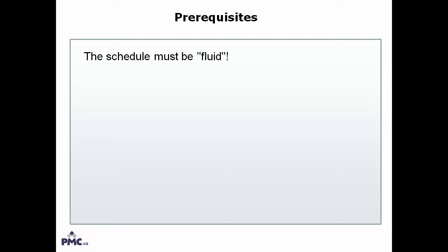The schedule must be fluid. This means that if we delay tasks and have them move into the future, they should be able to do so unencumbered. That means minimizing or even avoiding dependencies such as must start on, etc. Start no earlier and using deadlines works nicely. The network of dependencies should be complete. Leveling delays upstream should allow updates to the downstream activities through the network of dependencies. Many a time, I see schedules that use and set dependency types other than finish to start incorrectly, thus short-circuiting the fluidity of the schedule.